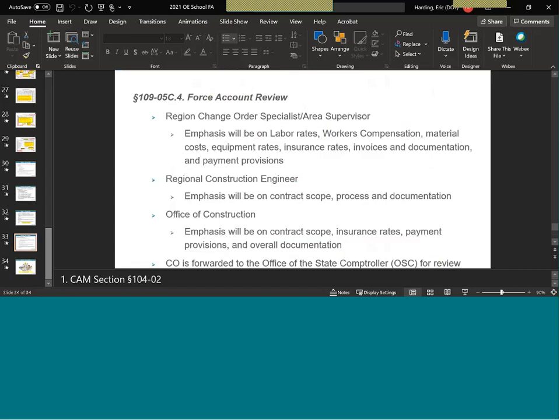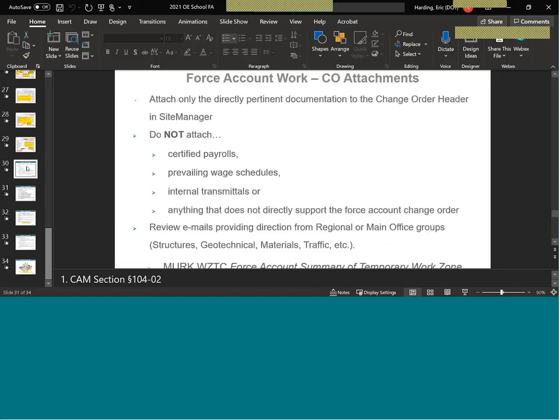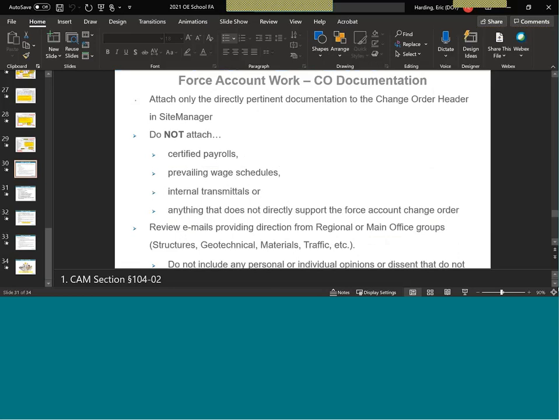I feel like I went through that fast. Do we have any questions? So if our other panelists can check their chat and see if they were addressed individually, looking at the ones that went through all of us. To clarify, equipment is recorded to the nearest half hour, but labor can be to the nearest quarter hour per the current specs. Okay.